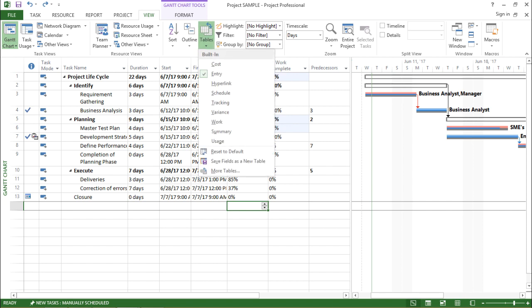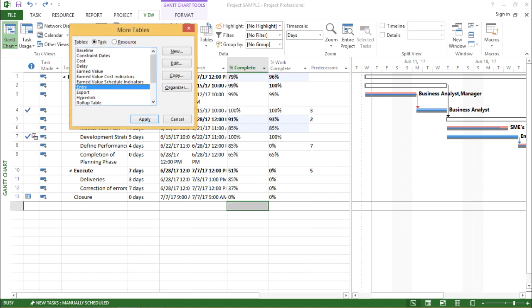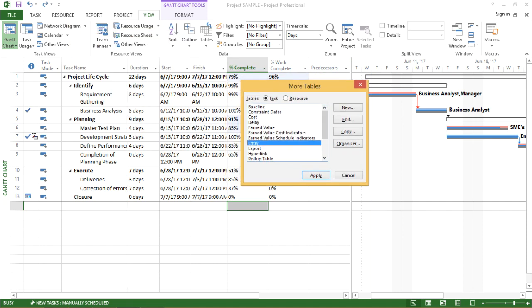If I click on this drop-down menu I have to move to the More Tables option. The moment I click on More Tables I can see there are so many tables available, but I want to click on Earned Value because we are doing Earned Value Analysis. So let me hit Apply.